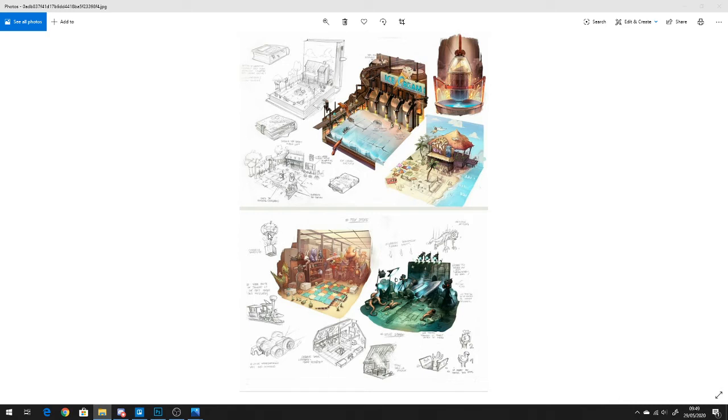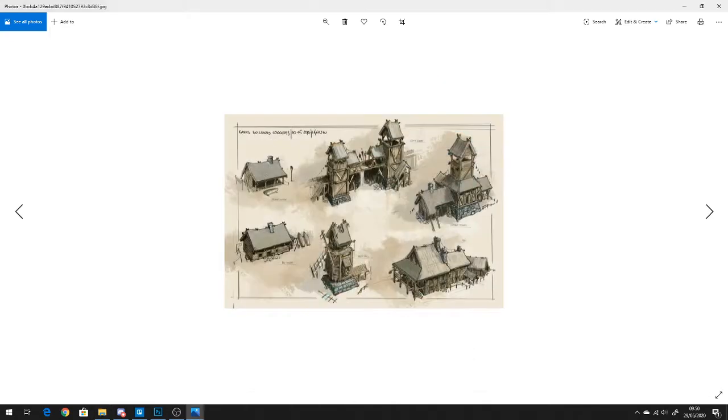So for instance, if the concept artist who has already been working with the art director has given all these tiny little props that you need to create, then you go like, okay, in order to do this, what is the most prominent, or what is the highest priority for us to create this level? If we need the house, we complete the house first, right? You see all these little tiny stones or whatever, not tiny details, that one can be P2, P3, nice to have, and so on and so forth.